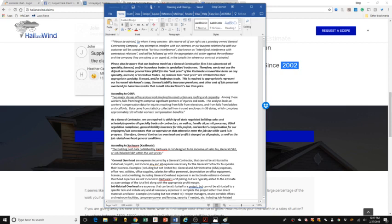Please don't do that. Also be aware, this describes the reasoning for changing the unit pricing for any of these specialty trades from the default demolition trade to the actual roofing or siding or overhead door trades that they're supposed to be. One of the major reasons is roofing and carpentry are the 2 most hazardous trades in the entire industry. Because of that, workman's comp and general liability for these trades is astronomical compared to general demolition work. We're not destroying the structure, we're actually reconstructing something, so we're going to be using licensed and or skilled tradesmen.